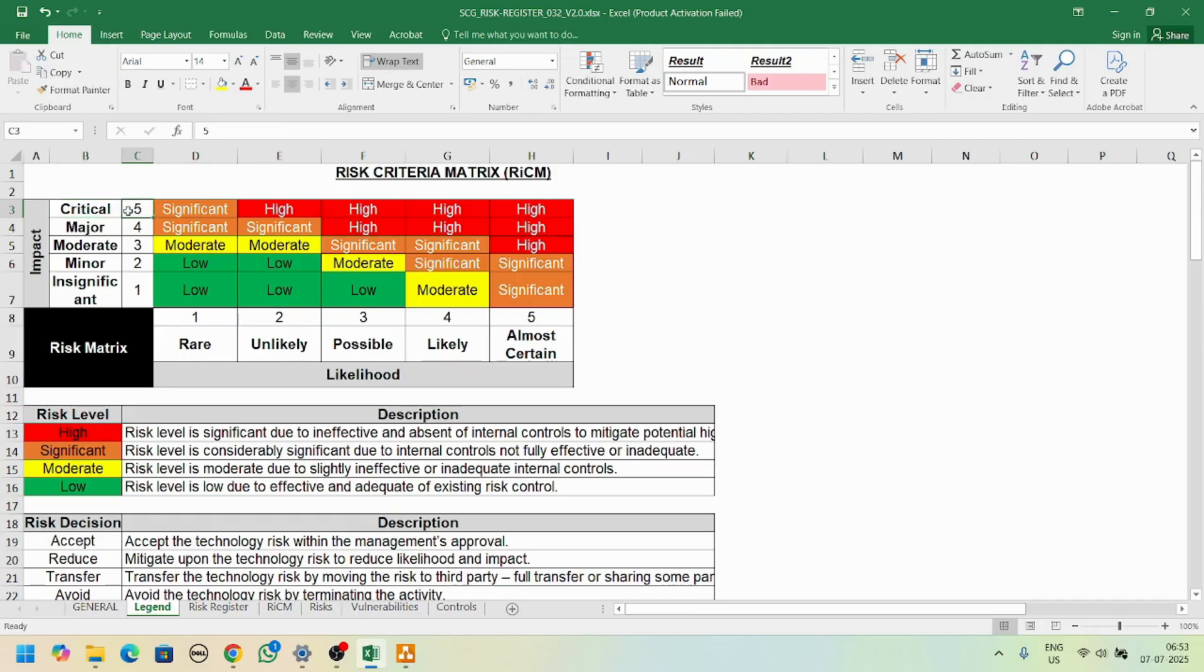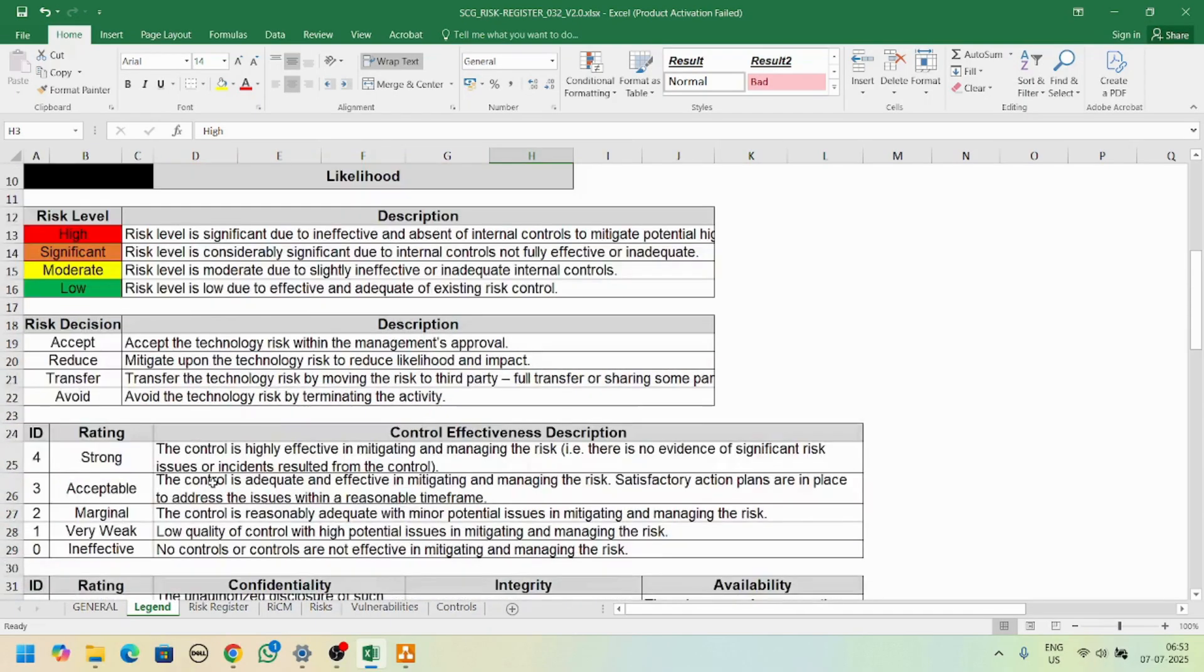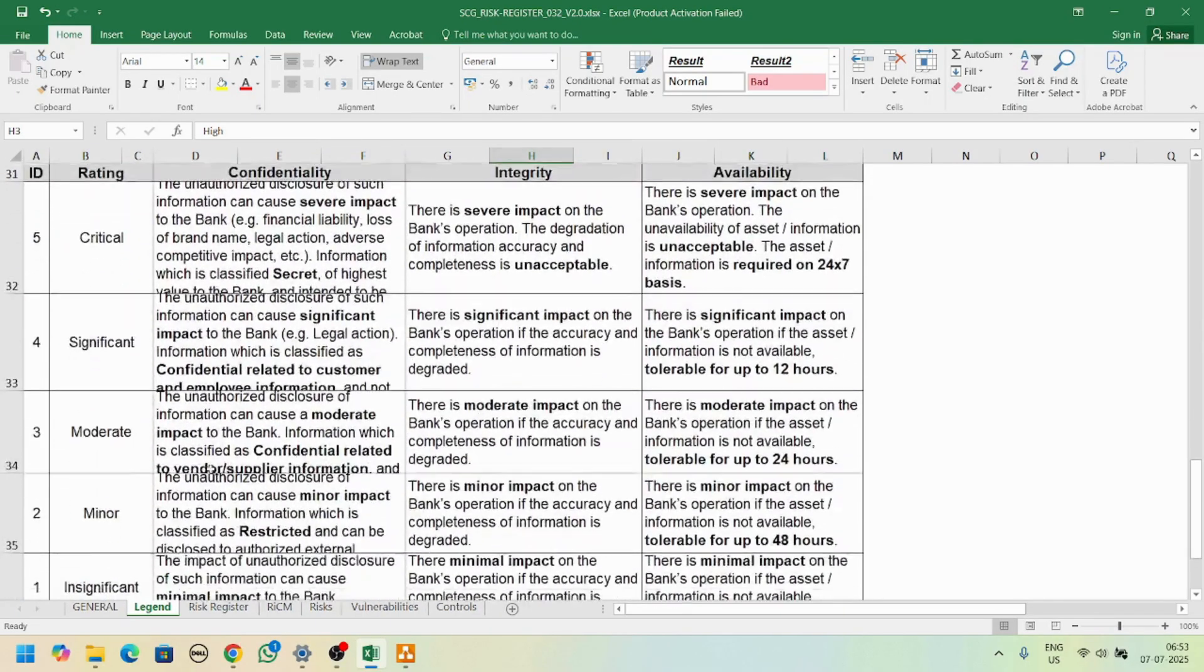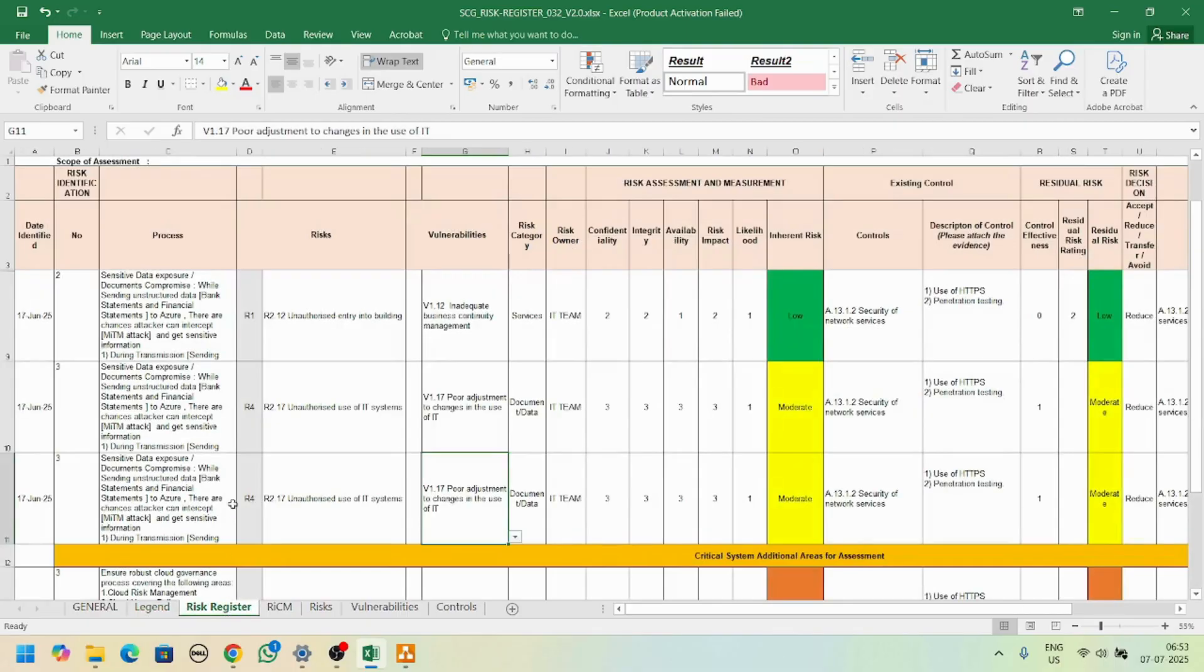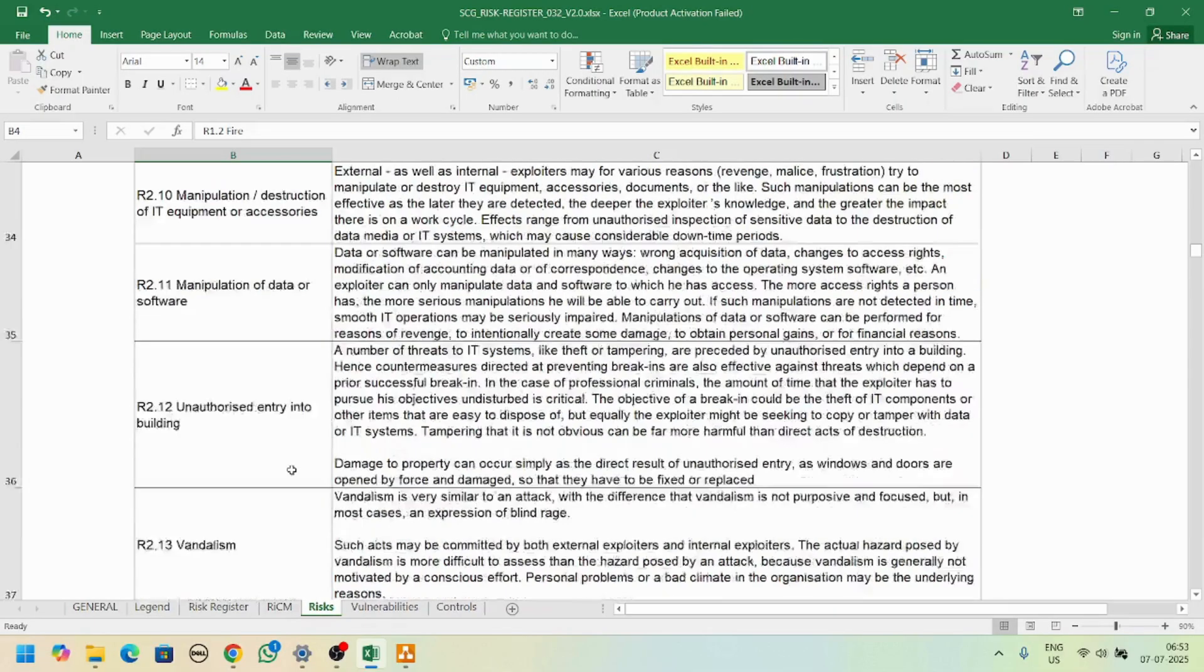If it is critical risk and it's almost certain, then it's a high risk and we need to mitigate that risk as soon as possible. These are some other details for the risk register. All these values are coming from other tabs, so don't delete any tabs or sheets from here.